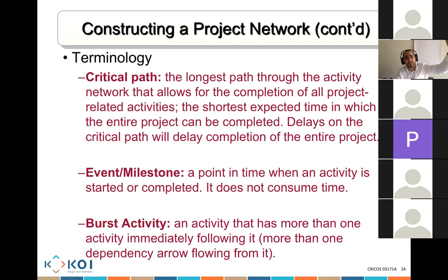But after I finish all the work for module 1, after I do the testing, development, analysis, coding and so on, the module 1 will be complete. So in my plan, I write module 1 complete. Now, module 1 complete is not an activity. It doesn't consume time. No one is doing any job. We're just telling you it is completed. That's what we call a milestone. It consumes 0 time. It's a 0 days duration.